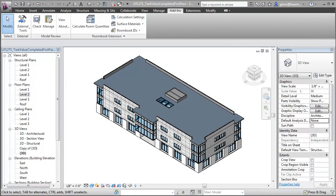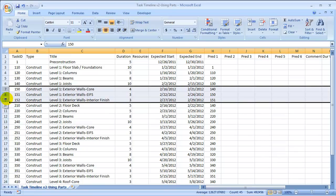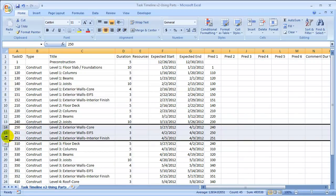With these new parts in place, we'll also need to adjust our task timeline to take advantage of the parts. So let's switch over to the timeline, and you can see that we've subdivided the exterior walls tasks at each of the different levels into three different tasks: 150, 151, and 152. Similarly, at the second level it's 250, 251, and 252. Let's return to Revit now and map these new task IDs to the parts.